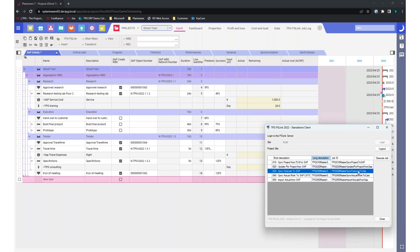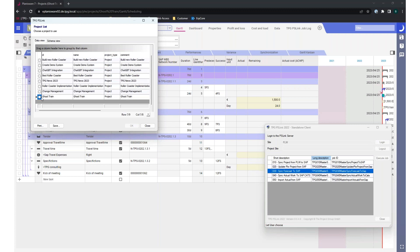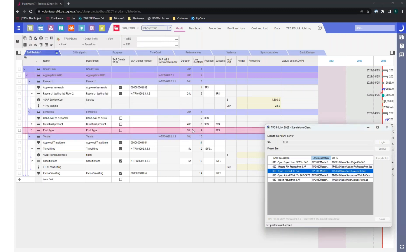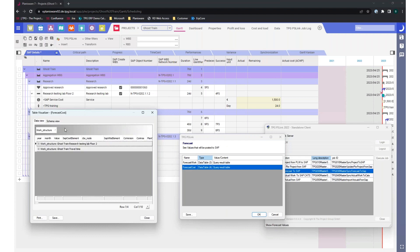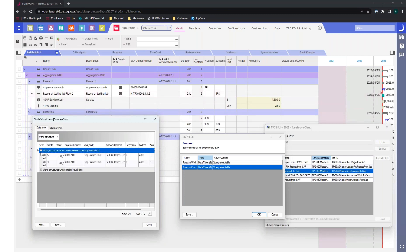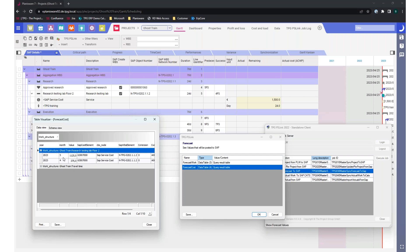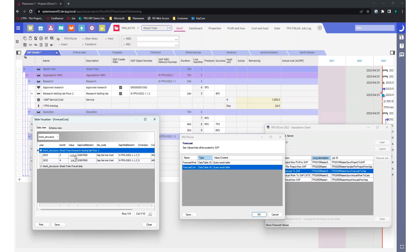Enough talking — let's show this. I'm going to execute the third use case. Choosing the Ghost Train project, I get a slightly different window. Looking at the cost tasks: for the research testing lab, we see the value of 1,500. This value is distributed by year and by month — we know that 375 euros are planned in April and 1,125 are planned in May. So we see this time-phased cost information in here.